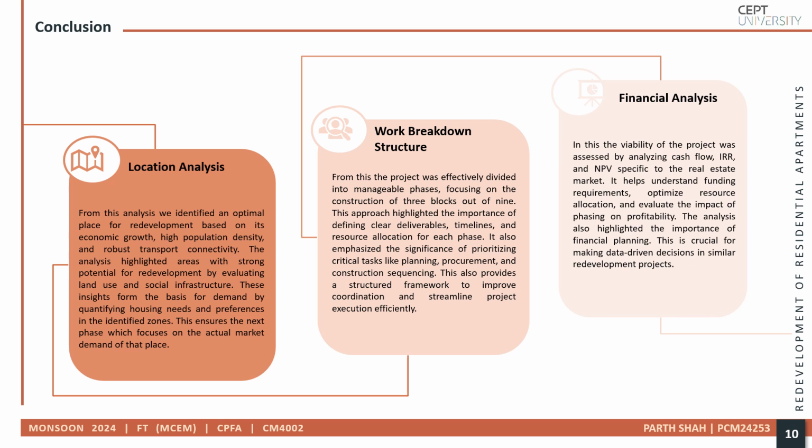execution effectively. In financial analysis, the project's viability was assessed by evaluating cash flow, IRR, and NPV specific to the real estate market. This helped in understanding funding requirements, optimizing resource allocations, and assessing the impact of phasing on profitability. The analysis also underscored the importance of good financial planning, which is essential for making informed, data-driven decisions in similar redevelopment projects. These steps together demonstrate a comprehensive and systematic approach to determine the feasibility of redevelopment initiatives.